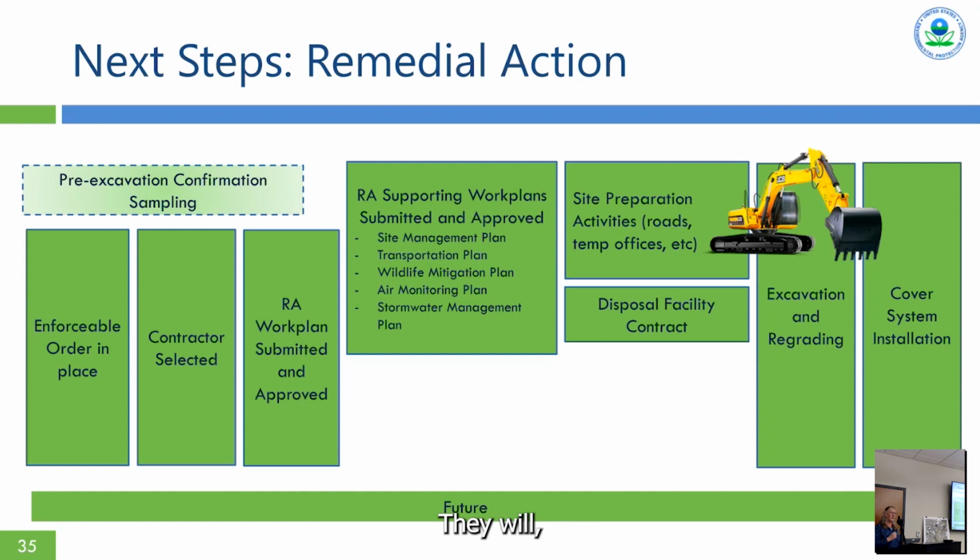Once we've approved that work plan and the supplemental documents, then that contractor will start to prepare the site. They will mark off where they're going to stage things, where they're going to maintain the containers that they're going to put the RIM in to ship off site. They'll design how the trucks move on the site to try and prevent the trash trucks and the RIM trucks from driving in the same areas, so that there's not cross contamination and so that the trash production can still continue while the remediation is happening.